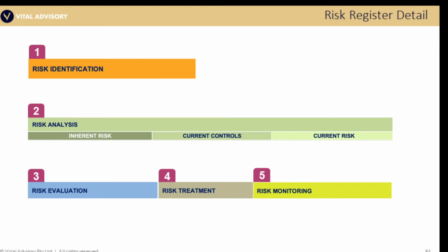And that could mean that the current control framework is not very effective just yet, and that's where the improvement is. Or it could be that you're missing current controls, and that's where the treatment lies, that you want to add new controls rather than fix them. So current controls, the last part of this part 2 analysis is to document the current risk status, likelihood, consequence, current risk, and then your evaluation.